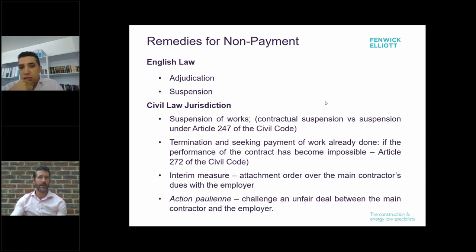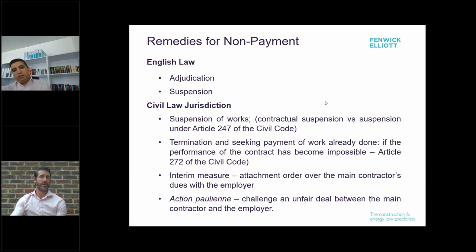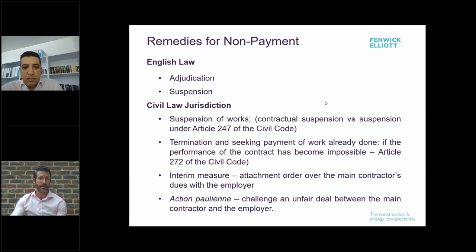The second remedy for non-payment in the Construction Act is the right to suspend the works. Section 112 of the Construction Act specifically entitles a party under a construction contract which is owed a sum to suspend performance until payment is made. Suspension can be made on just seven days' notice, and if delay occurs to the works of the party who has not been paid because of that suspension, that party will be entitled to an extension of time.